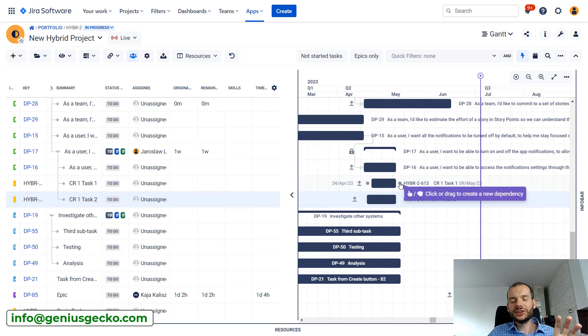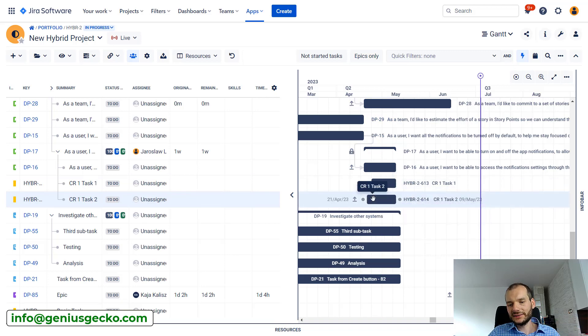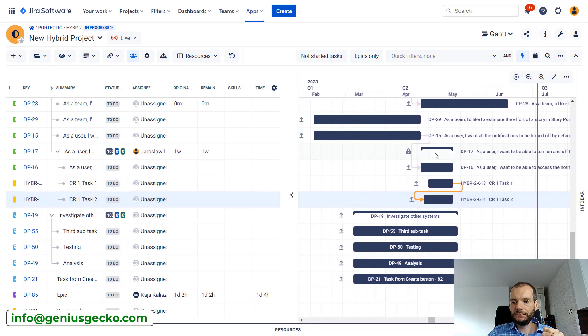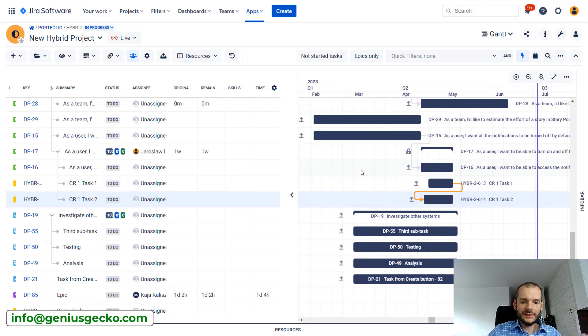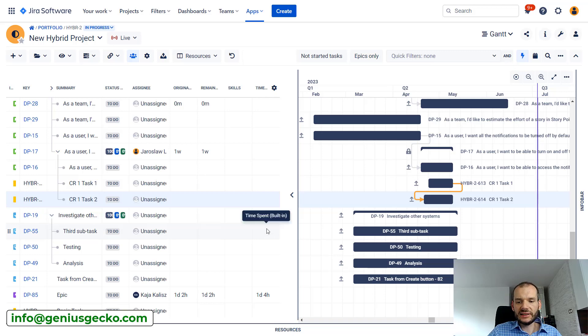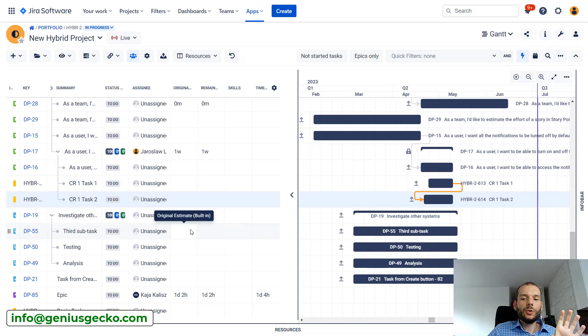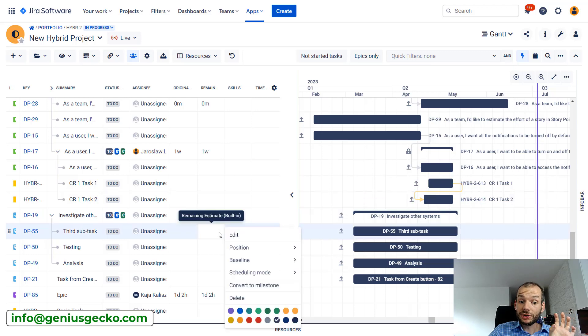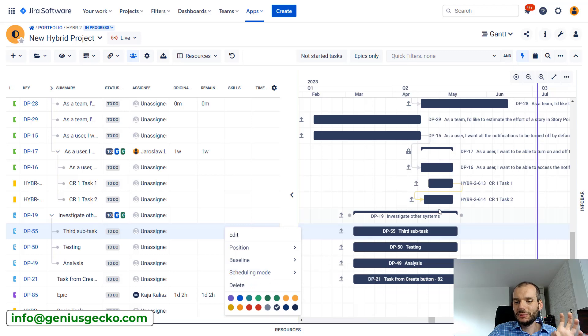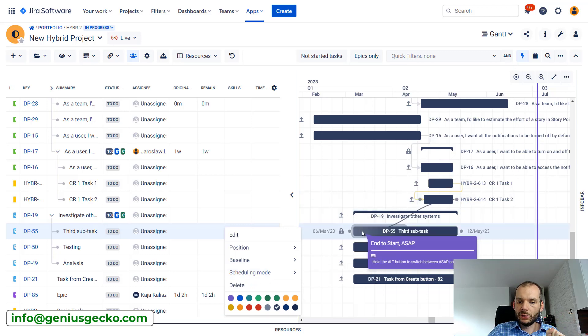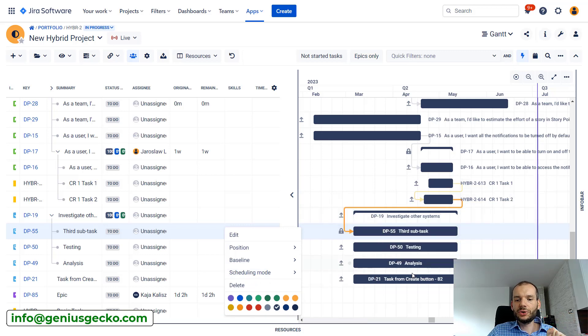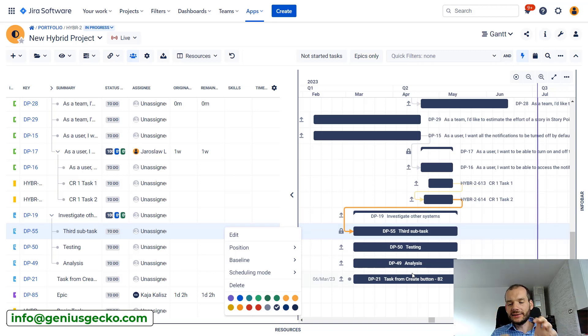So now the tasks or the work that we identified has dependencies. These two tasks have dependency between each other, but also they have to be done before this, for example, third subtask. So we will create dependency between those. But before that we will also lock this task. Again we do not want it to be moved. So we will lock this task, create the dependency.